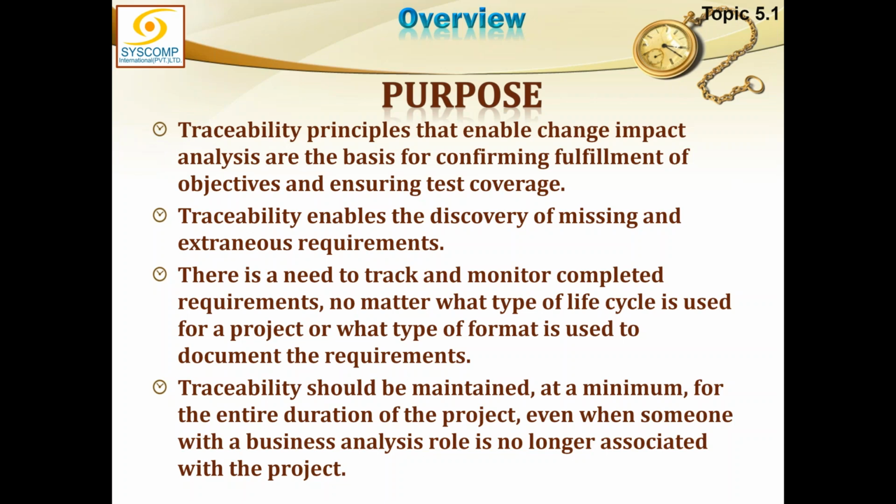There is a need to track and monitor completed requirements, no matter what type of lifecycle is used for a project or what type of format is used to document the requirements. Traceability should be maintained at a minimum for the entire duration of the project, even when someone with a business analysis role is no longer associated with the project.